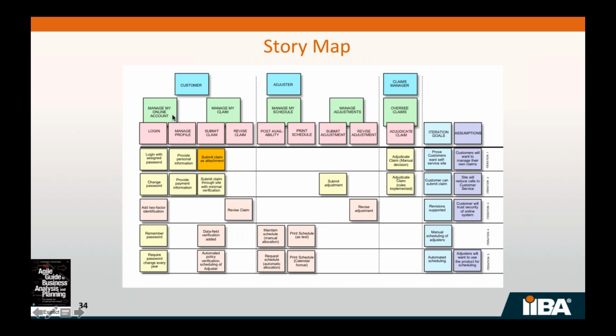And then finally, the story map that I talked about earlier has this added thing that when you read the story map from left to right, it shows us the order in which these stories are probably going to be executed when the user actually has them available. So this story map basically breaks down into very large feature use cases up along the top in the order in which they would happen.